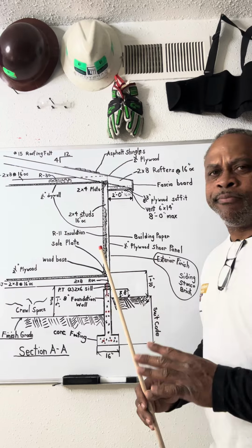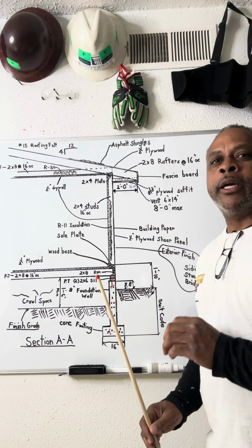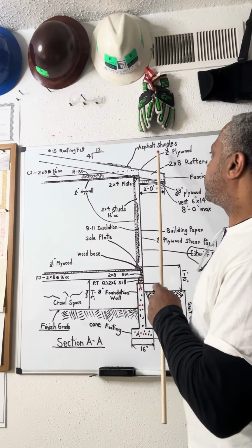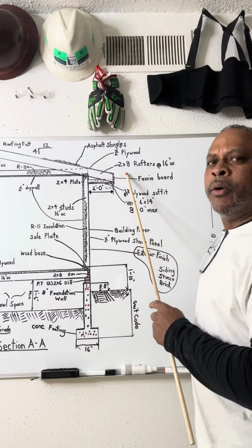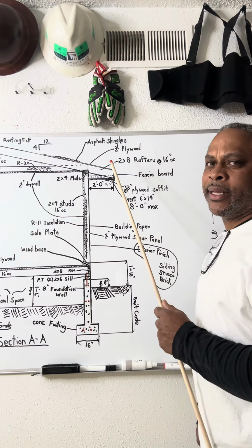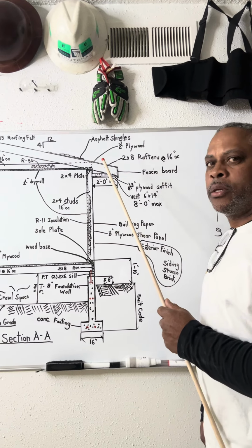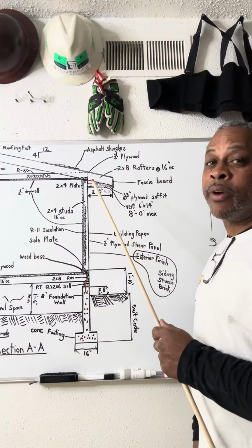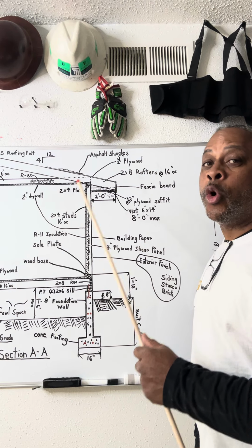Very simple, but you need to do that, because you may see on the roof plan that a rafter is what is called 2x8, but what if on the other plan it tells you it's 2x10? So go figure. And there could be various different sizes of lumber dealing with rafters depending on where they're located.